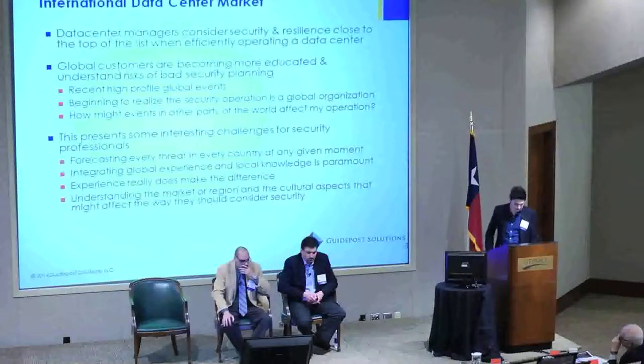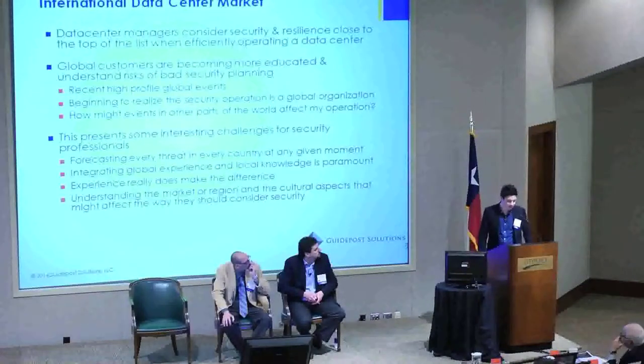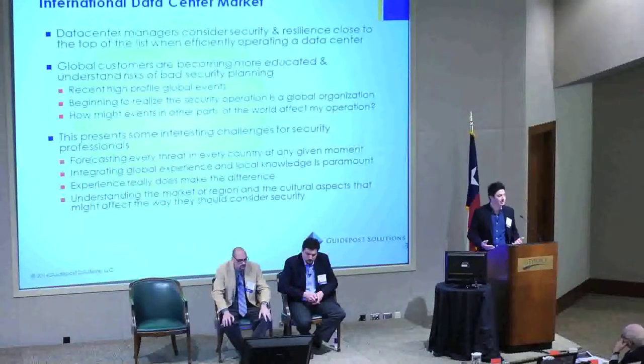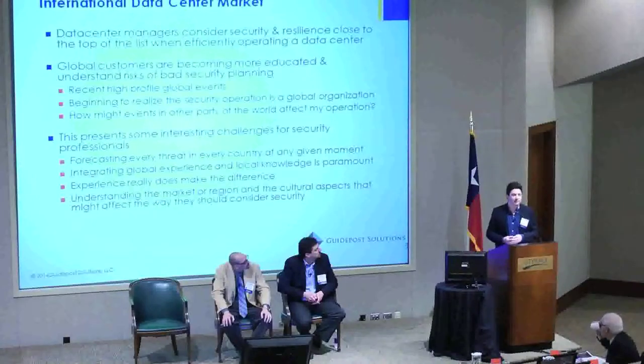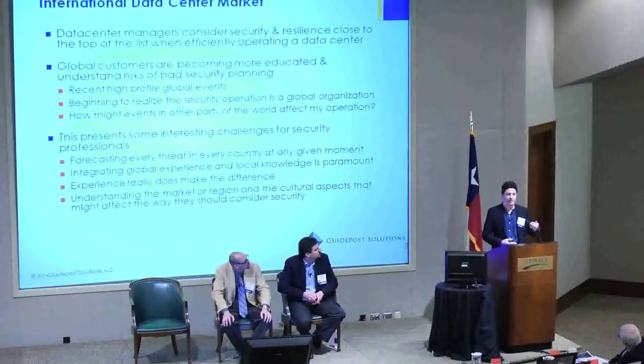Just touching on something Shane said earlier, and you'll understand, I'm sure, that nobody can predict every threat or every risk in every country at any given time. It's impossible to do that, but there are some things that we can do on the ground to make things easier. We can do threat assessments, we can do trend analysis, and this is something that we've started doing quite recently. That could be collating every RFI or every question that we've received in, say, the last 18 months, stacking them up by region and saying, how many times has this come up? This might be a good idea to consider in this place. That's how we try and use our experience.